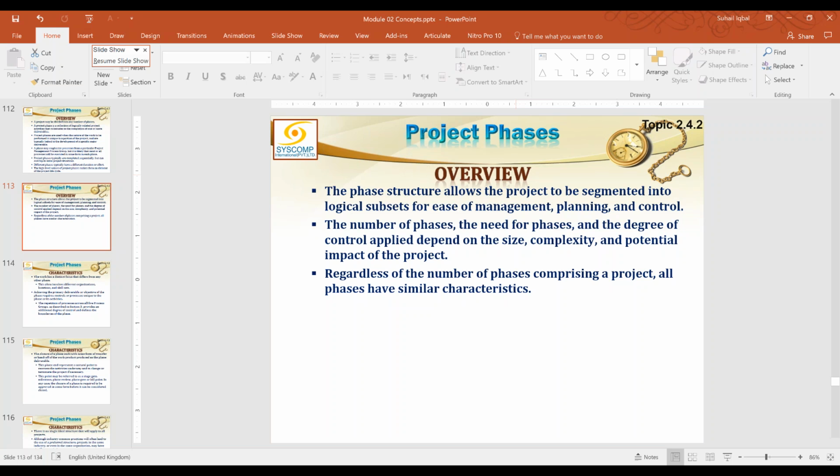When they come up with a new idea, they don't just make the plane altogether. They make a small little model first, test it in small wind tunnels and all that, and then ultimately they correct the design there, and then they make a larger model, then a further larger model, and ultimately the full-size model. And this is called the incremental life cycle. This is another kind of learning.